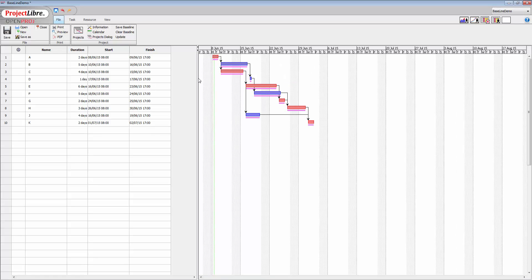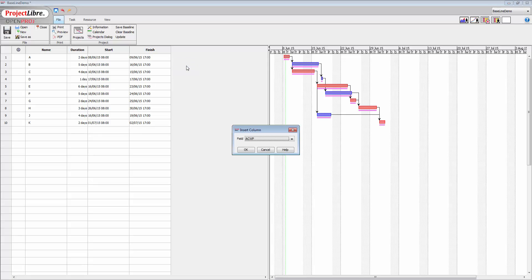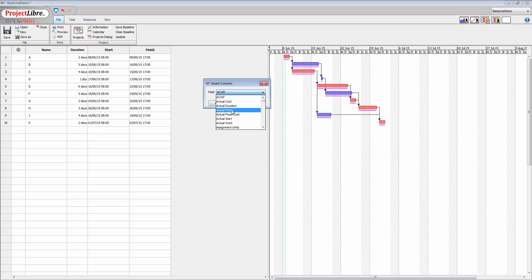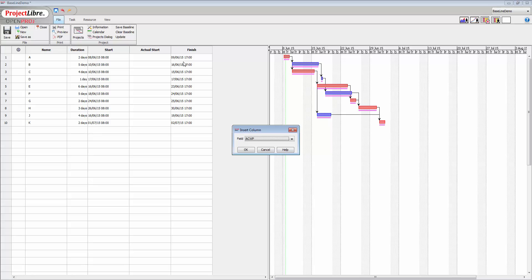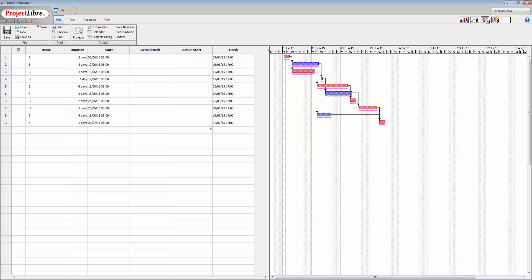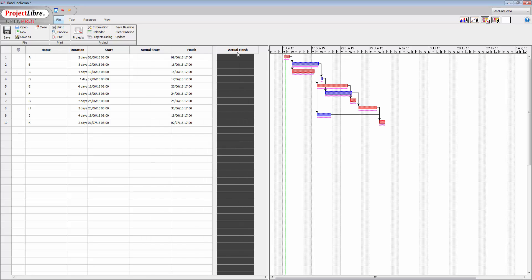Now what we can do is have a look at some tracking information as well. So what I'm going to do is insert some columns. This time right-click, insert column, and I'm going to put in the actual start. Click OK. And I'm also going to put in the actual finish, there we go, actual finish and click OK. Now it makes sense to try and keep these together, so what I'm going to do is grab this actual finish column and put it here. So now we've got duration, start, actual start, finish, and actual finish.